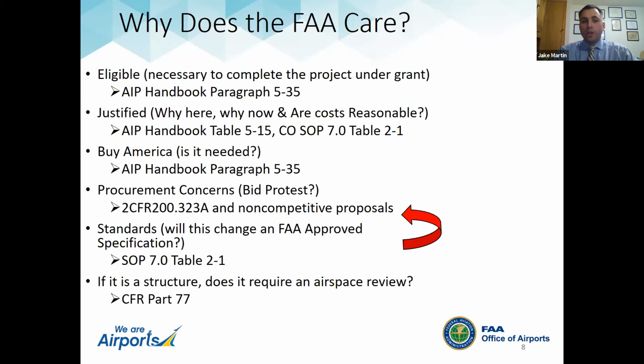If you execute the change and you outlay these costs and pay the contractor, a bid protest could come into play after you've already outlaid the money, and we might have to determine that these costs are ineligible because they didn't comply with some federal procurement requirements. So our role is just to advise you on the risk. A lot of times it's not that big of an issue, but on large dollar change orders where you're removing or adding large quantities of materials for some reason, it gets to be a bigger issue.